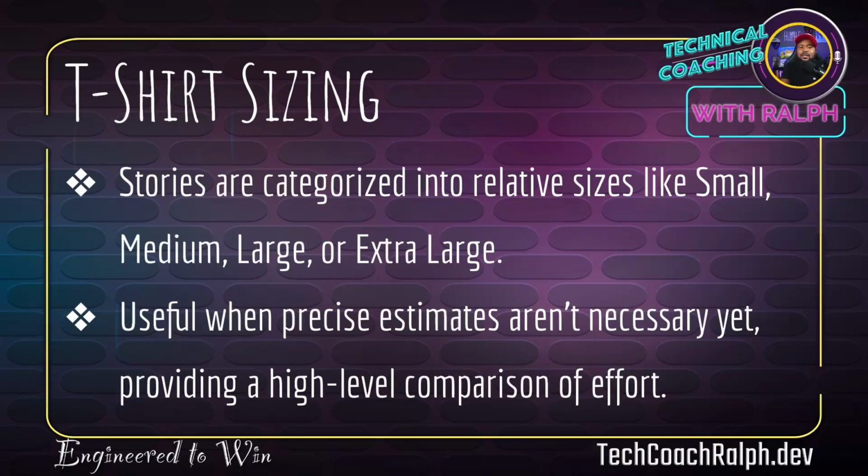T-shirt sizing. Stories are categorized into relative sizes like small, medium, large, or extra large. Useful when precise estimates aren't necessary, providing a high-level comparison of effort, right? So that's where I've used it, where we might say, okay, we have this big initiative to do and we haven't broken down the story. Like let's say we have an epic, right? We haven't broken down the individual stories that make up that epic.